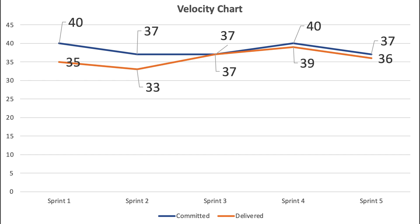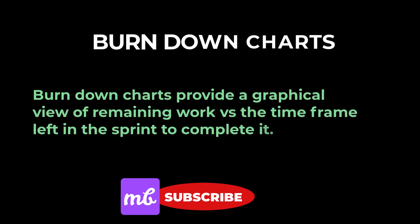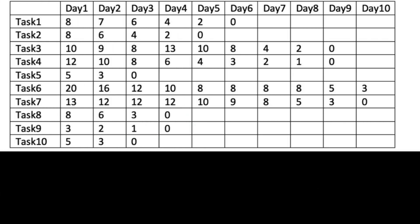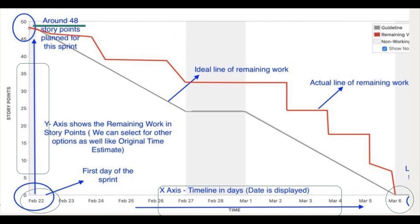But let's say we want to track what's happening in between the sprint so that correct measures can be taken at the right time. In that case, we use burndown and burn up charts. We will discuss burndown charts first. Burndown charts provide a graphical view of remaining work versus the time frame left in the sprint to complete it. The same information could be shown in a tabular format, but with charts it's easier to view how much total work is remaining with respect to the number of days left.